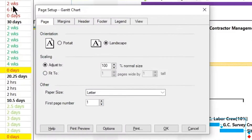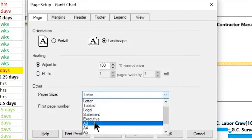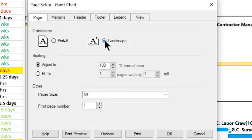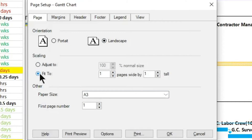On Paper Size, select A3 and set the orientation to landscape. To print the entire view on one page, select the Scaling section and set it to fit to one page wide by one tall.